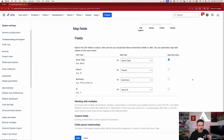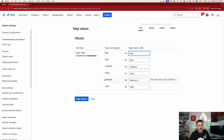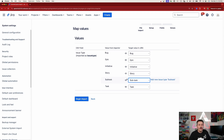Now map your field values for issue type — this is very important. As you remember, the subtask name as I typed it doesn't register because I need the hyphen. So I'm going to map it: click Next, and on the next screen you'll see subtask doesn't match — I'm going to connect it with 'Sub-task' with the hyphen. Everything else looks fine, so I'll begin the import. Hopefully that mapping works — I haven't tested this live so you'll see my real-time reaction.